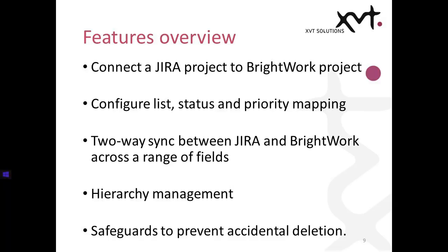So one JIRA set of issues could be split into multiple BrightWork lists. And you can also map status and priority fields between the two. There's a two-way sync between JIRA and BrightWork across a range of fields like title, last updated, assignee, due date, effort.